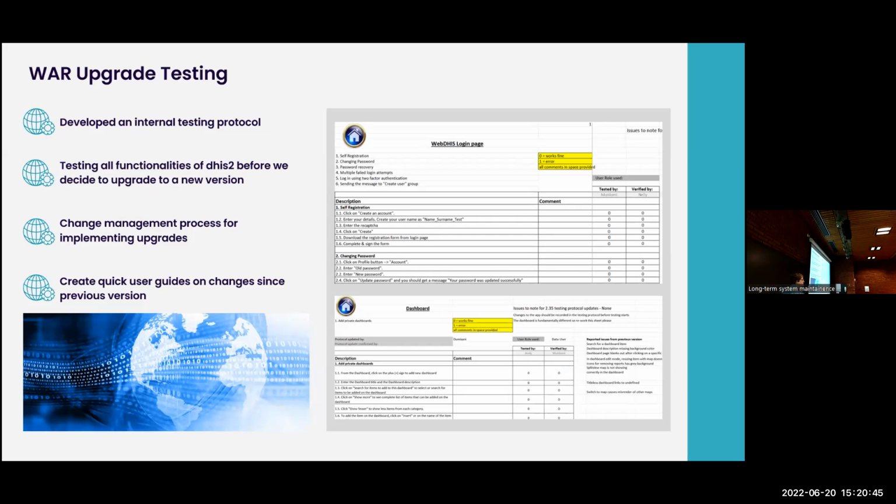Phil told us that actually that is available from Oslo, so we will be helping them test a little bit more. But we then have at least a number of users, including some of our provincial users, testing these functionalities. And so we don't just test the new functionalities, we test existing and new functionalities. It's very important for us that whatever has worked before does not break when we upgrade. So we would delay an upgrade if there's a serious bug that we know that we had before.